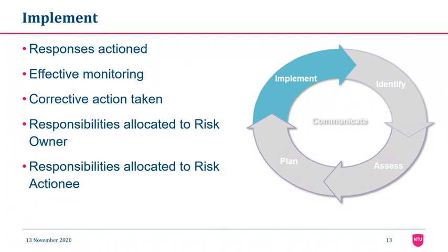In the risk register, a project team member is assigned to take responsibility for each risk response. This process ensures that each risk requiring a response has an owner who monitors the response, monitors the risk, and takes further actions if required. And basically, we have two new roles in the risk register. First one is risk owner, second one is risk actionee.